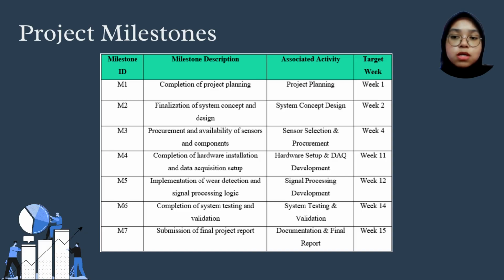The next milestone involves the completion of hardware installation and data acquisition setup, ensuring that the system is physically ready for operation before the implementation of wear detection and signal processing logic takes place. The final milestone is the completion of system testing and validation and the submission of the final report in week 15. These milestones help us monitor the time taken and ensure that the project is completed within the planned time.